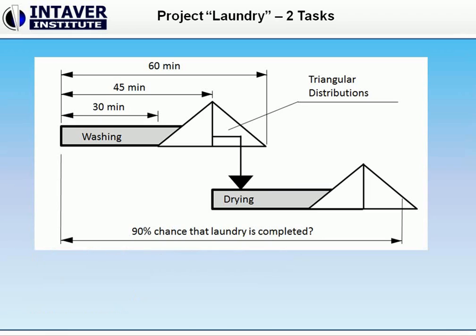Let's take a look at a simulation of project scheduling. Project schedule activities are linked to each other — for example, one activity can start only when the previous one is completed. Such relationships between all activities in the project schedule are called a precedence network.